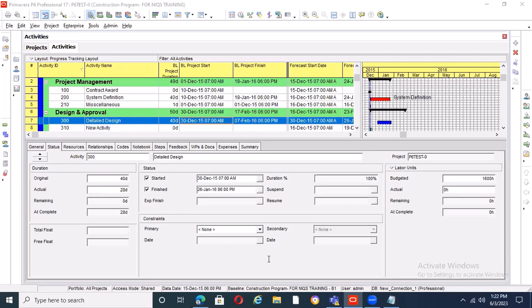Some contractors do that when they are bidding for projects: they go for the lowest bidder, the lowest of low. And when you get into the job, you start complaining. Where were your eyes when you signed this contract? Now you'll be using one way or the other to try to make money. The contract says you start, you execute this work, and we pay you for value of work done. We're not mobilizing you a time. We're going to pay you value of work done. And we're not going to pay for materials on site. We are going to pay for materials installed.